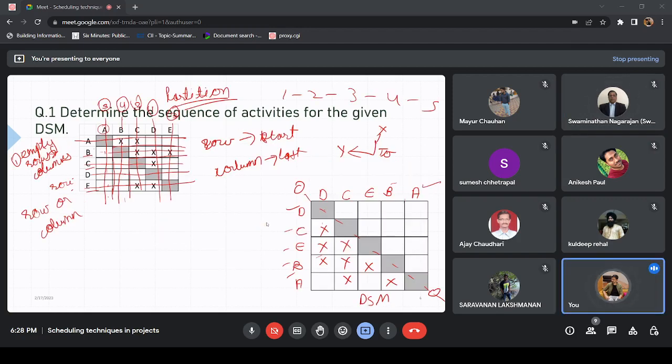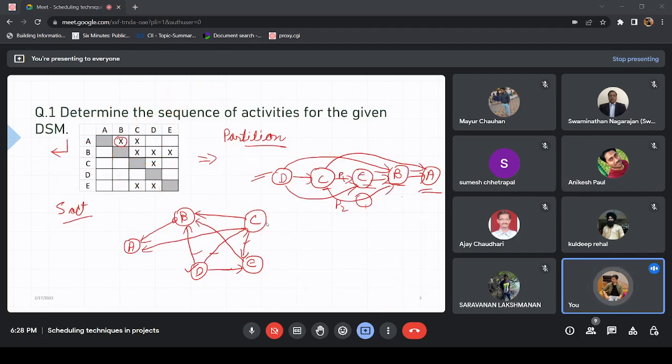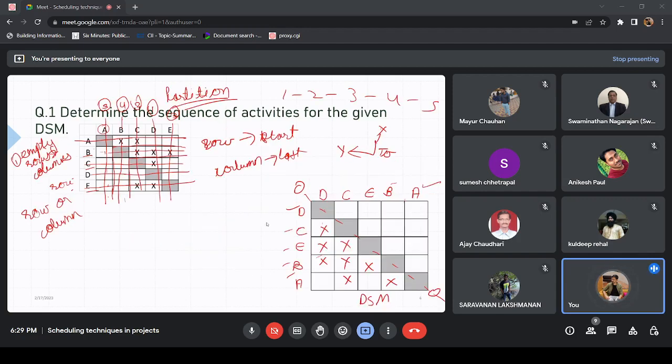Okay. So in this case, you can see that we have got activities in sequence with all the arrows moving forward only. In that case, we are getting a lower diagonal matrix. If this were a CPM problem, we could solve it directly without going into DSM, with the methods we have already studied, which did not take care of cycles or loops.